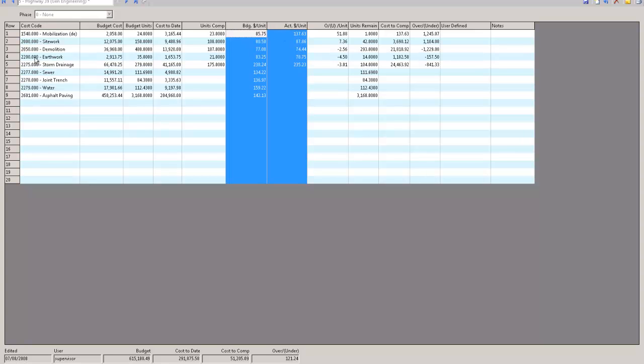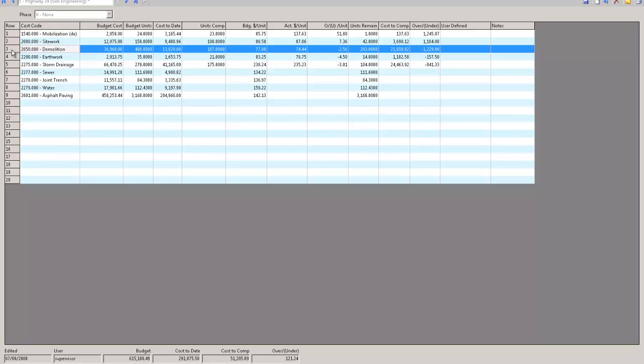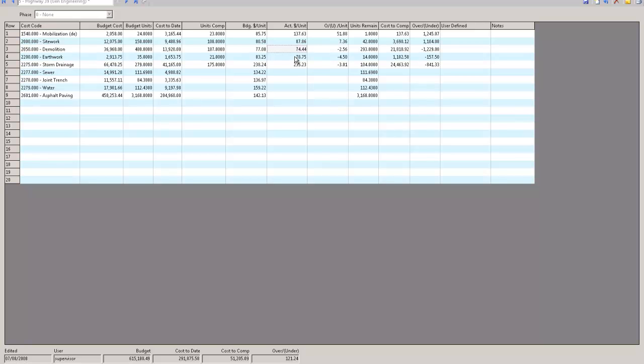But at the end of the job, I can come back and say, exterior painting on a 25-foot tall building, this is my unit cost. It's $74 a square foot. Obviously, this is not what it's going to cost you, it's a lot less than that. But I can look at how well I did against my budget. Before I bid another job just like that, I can look at the last 3 or 4 jobs and this task code and say, this job was 74, the job before that was 75, and the job before that was 73. I'm going into this job with a $75, $76 budget, and I feel pretty comfortable. If the estimate in front of you was for $57, when it's been costing you almost $20 more than that, you'd have to question the legitimacy of that number. That's what this is for. It's to show you what you've done in the past so you can use it in the future.